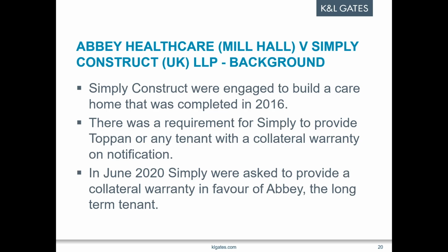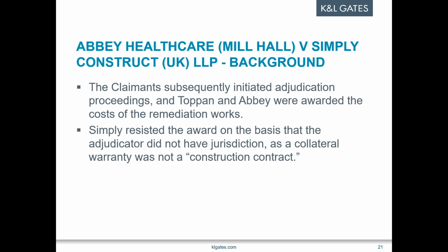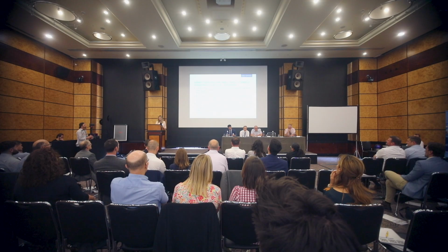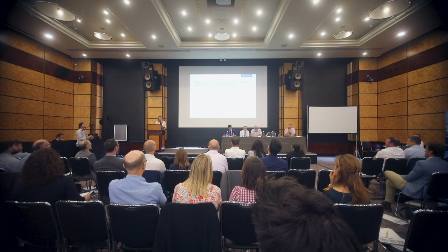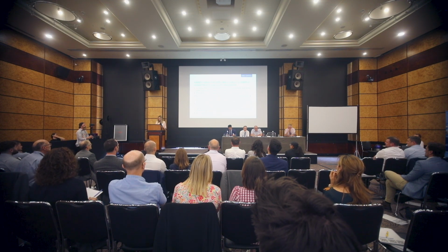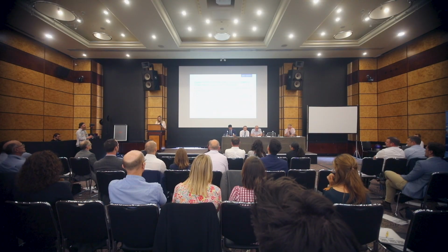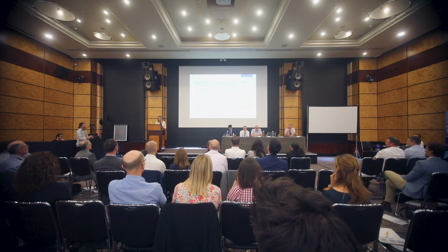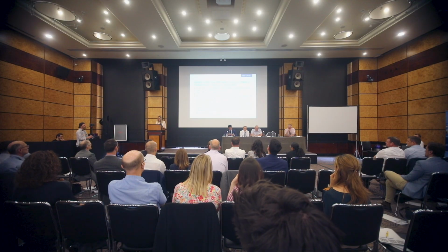There were adjudication proceedings, and both parties were awarded the cost of the remediation works. Obviously, Simply Construct resisted this on the basis that the adjudicator did not have jurisdiction, as the collateral warranty is not a construction contract. And then initially, the Technology and Construction Court determined that the collateral warranty was not a construction contract. It was not an agreement for the carrying out of construction operations, as Topham and Abbey did not have a right to adjudicate, and they were both required to bring fresh proceedings.